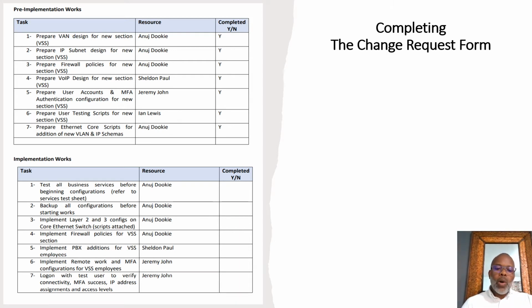We always walk into an organization and have them understand the importance of understanding that everything is functional before any changes are made. We work with the organization to define those lists of critical services that need to be tested before and after each implementation. That's very important, guys.